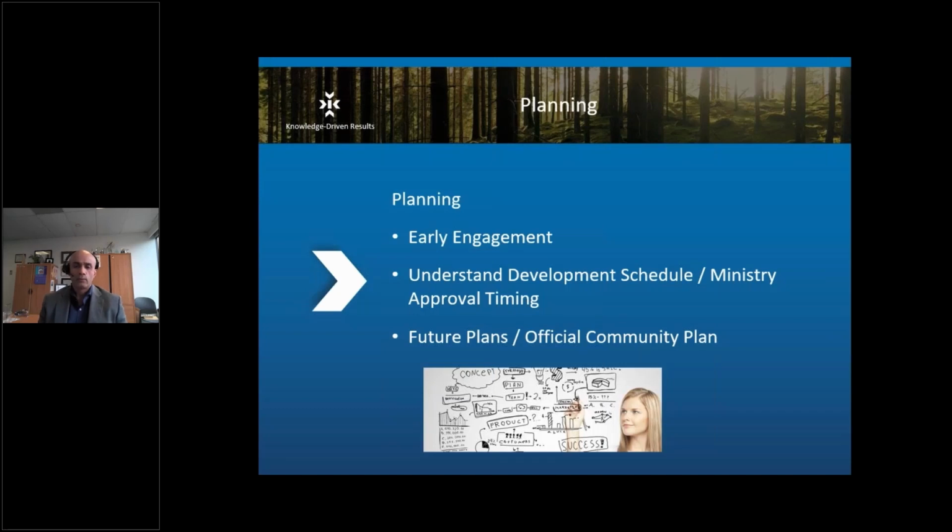At Keystone, we've been recommending approval in principles over releases from a scheduling point of view. The release process is only triggered when the city forwards the SES to the Ministry of Environment. That may impact your scheduling requirements. With an AIP, you can start earlier and have that in hand prior to your client applying for rezoning or subdivision or development permits.